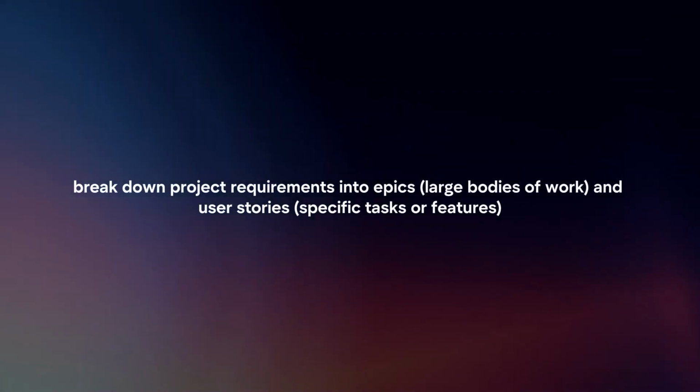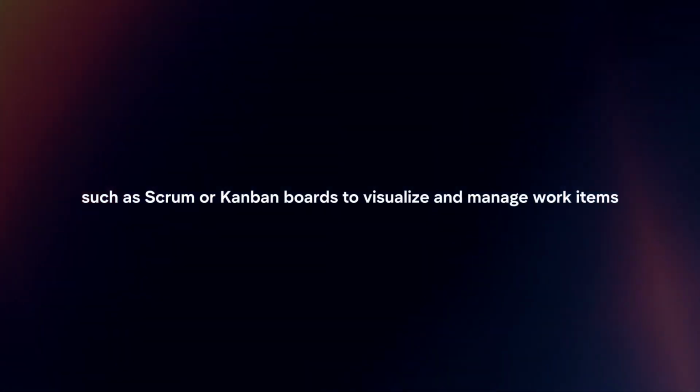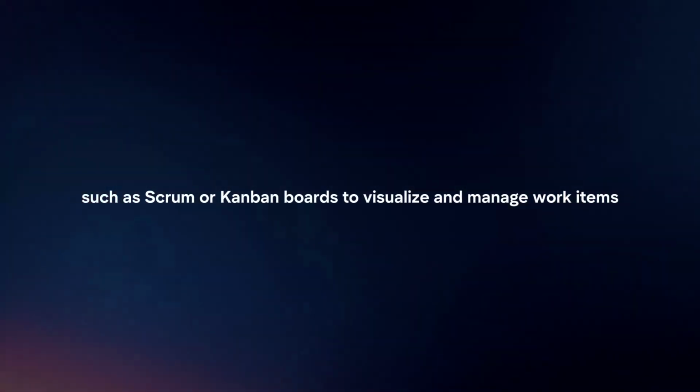Define epics and user stories. Break down project requirements into epics and user stories. Set up boards. Use Jira boards such as Scrum or Kanban boards to visualize and manage work items. Customize boards to match your team's workflow.